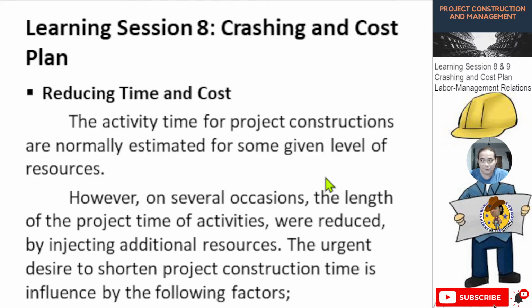Number one, you increase the man hours of a certain activity. If you will not add people as your resources, you have to conduct overtime, meaning you tell your people to work overtime so that their activities will be finished ahead of time.